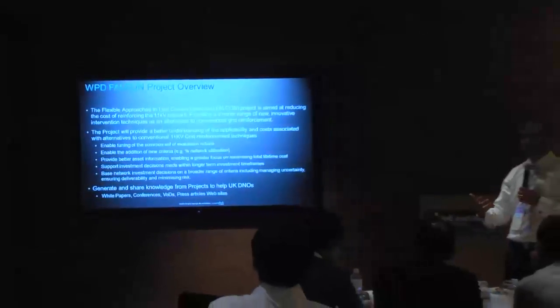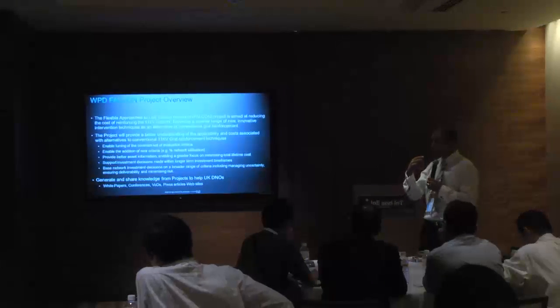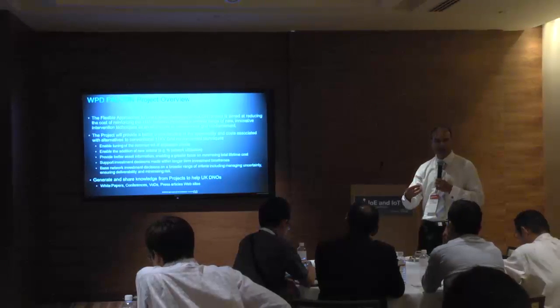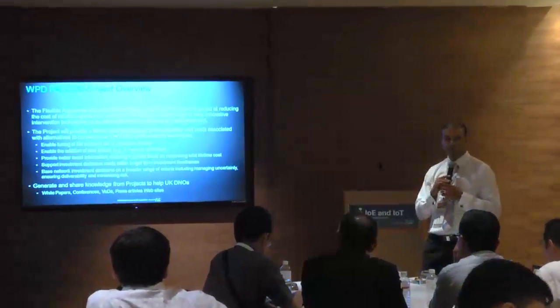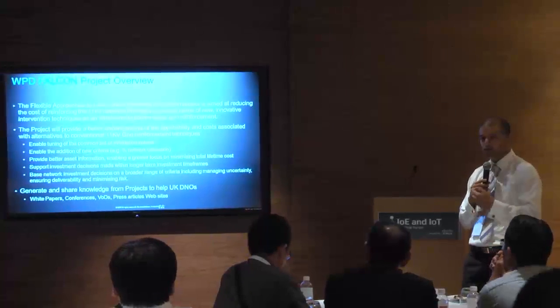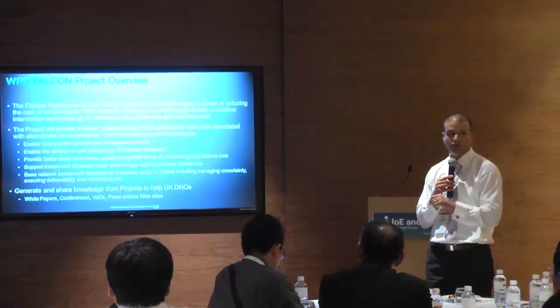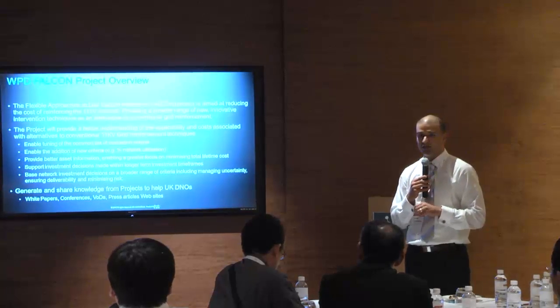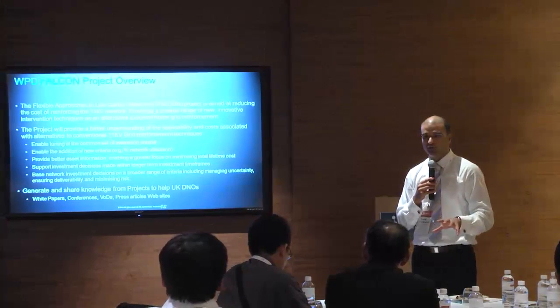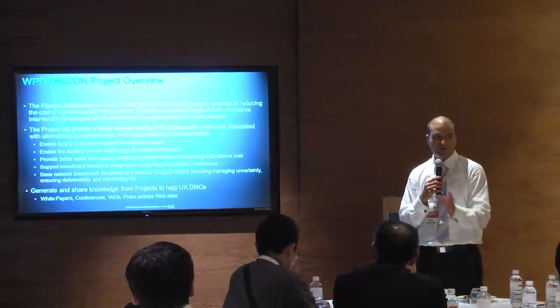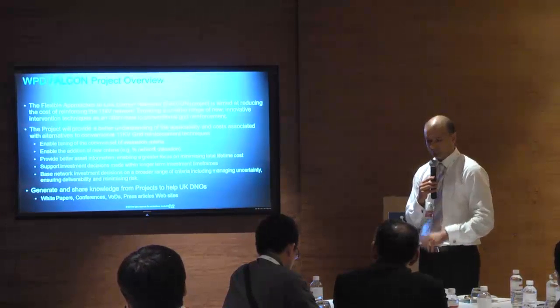introducing these intervention techniques within representative parts of their network, and whether or not there is a case for the United Kingdom regulator to approve Western Power and other utilities to roll these technologies out across the United Kingdom. That is, trial the solution first, understand the benefits before we invest in a full-scale rollout.